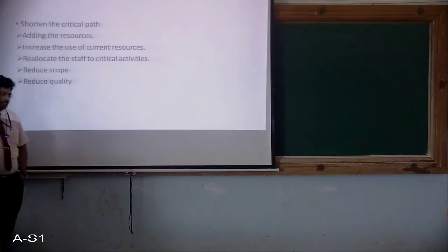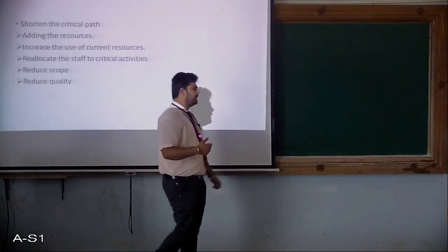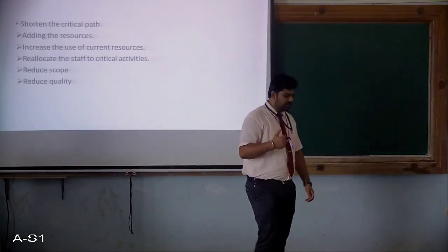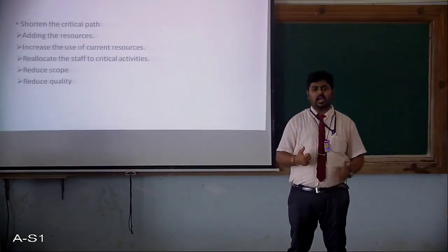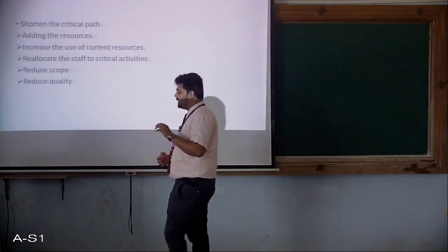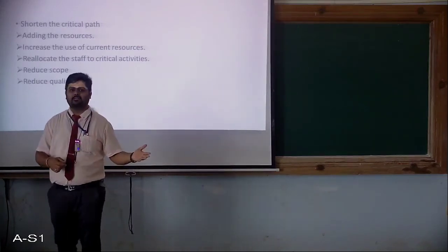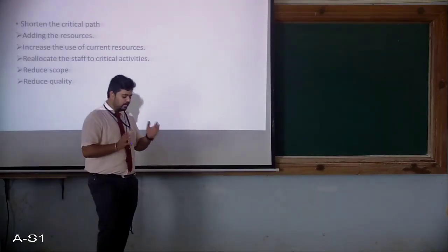Adding the resources means what? First you have to identify which is the mandatory requirement, which are the critical activities of that project, and some staff or some resources can be shared from non-critical activity to critical activity so that it goes very smoothly.